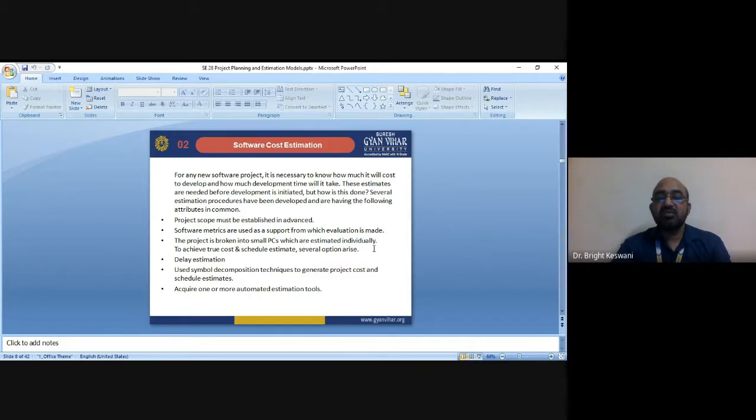When we start the discussion on software cost estimation, we should discuss schedule estimation. Schedule estimation and staff requirement estimation may be the most important activities after cost estimation. Both are related if phase-wise cost is available. The goal of schedule estimation is to determine the total duration of the project and the duration of the different phases. So how to calculate the schedule is an important thing.